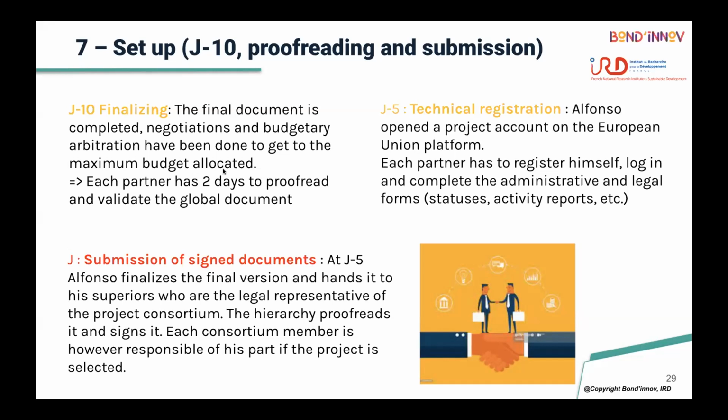So at 5 days to the deadline, we are on the technical registration. Alfonso opened a project account on the European Union platform. You know what, this is something I wanted to change, because this is absolutely wrong. We cannot wait 5 days before the deadline to start opening the project account on the submission platform. Even if you submit a scientific paper, you need to open your account days before. So my advice is to do it at the very beginning of the call.